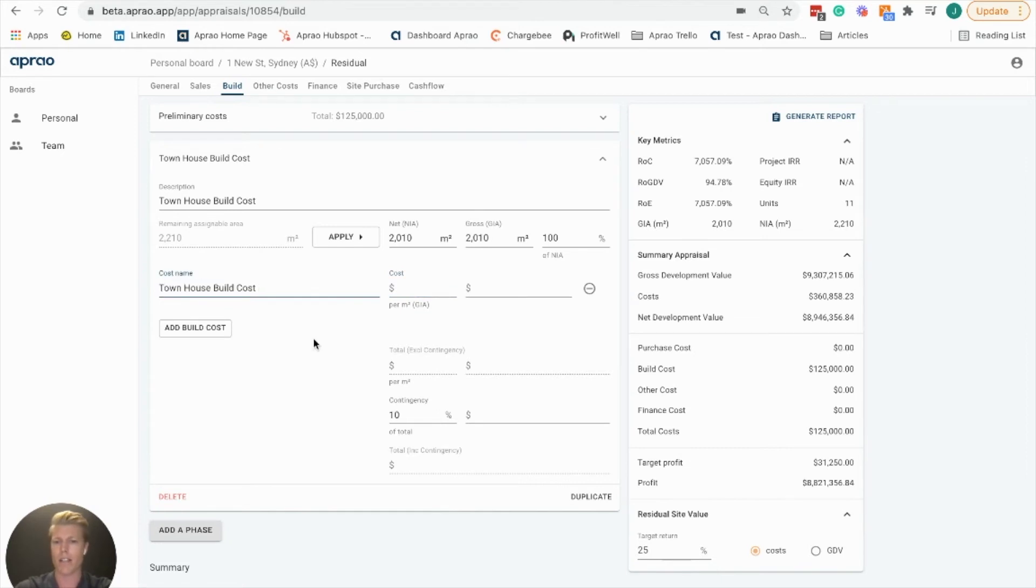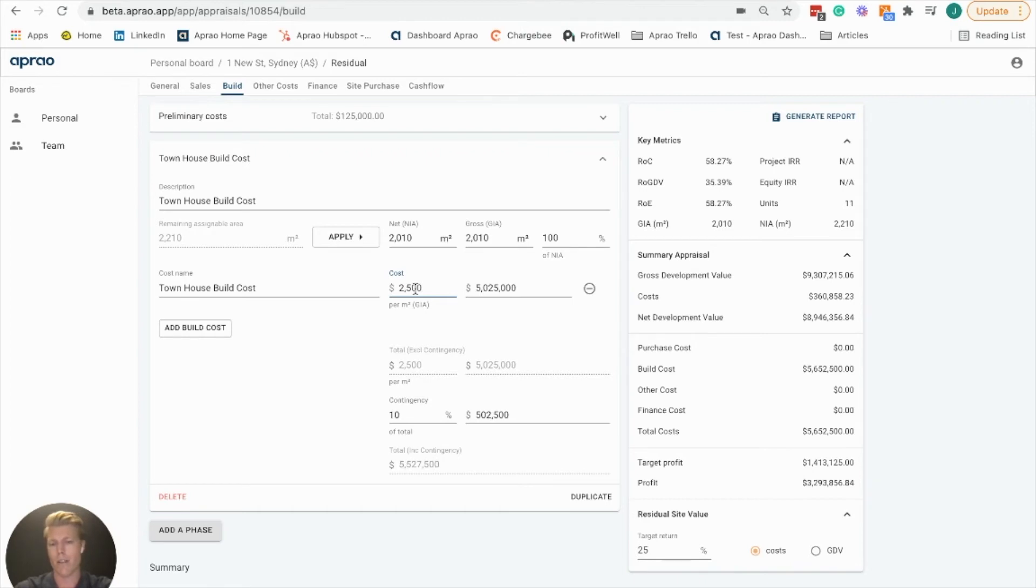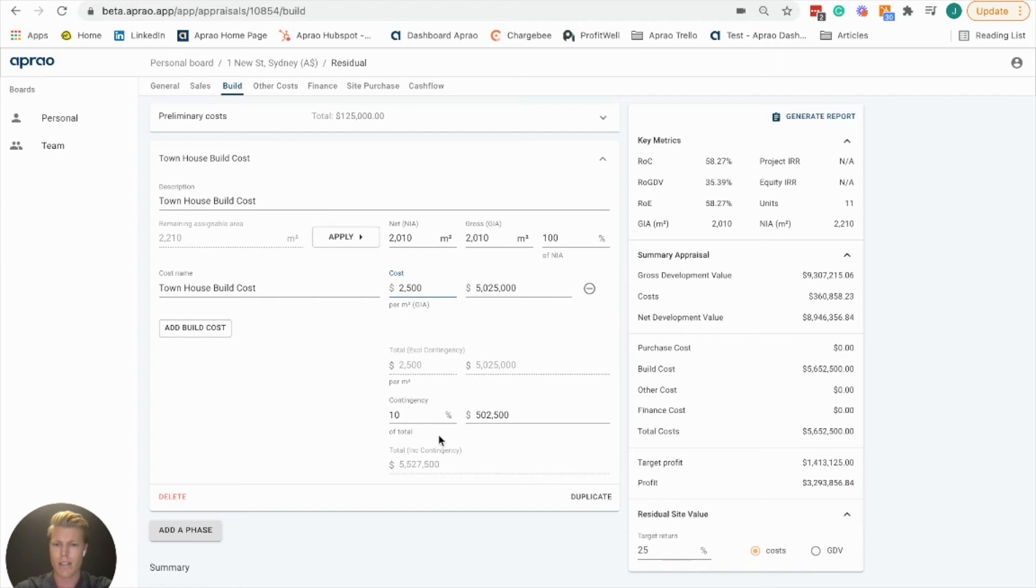We're going to say maybe we can get away with $2,500 per square meter for our townhouse build. Down here you'll see the contingency. We've added in 10% contingency.